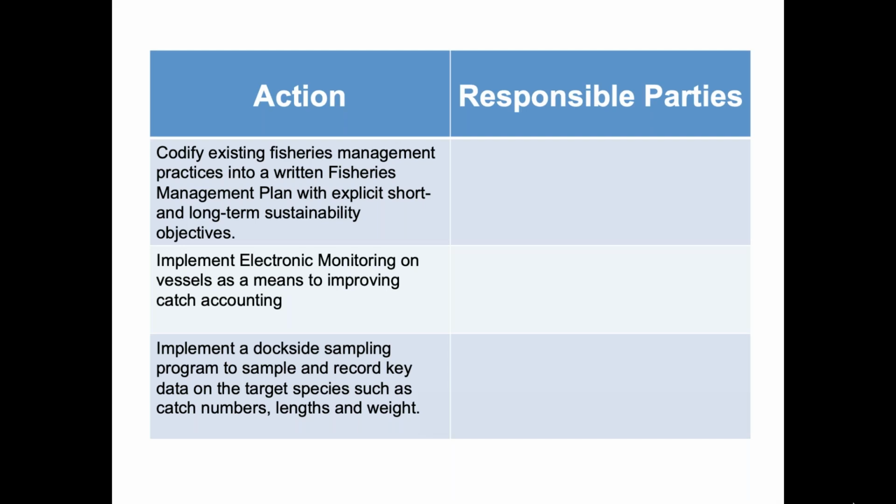In my experience, it's really difficult to develop a work plan that relies on parties that are needed but have not agreed, or at least are not aware of the need for them in order to achieve that action. If you can't get those parties, then you should think about redevising that action, or the plan, or the people involved, because your chances of success go down if you need people who aren't in agreement. And it relates to Albert's question: in agreement doesn't necessarily mean having signed a paper that says yes, I agree, but at least being involved enough, or notionally understanding what their role is and why.